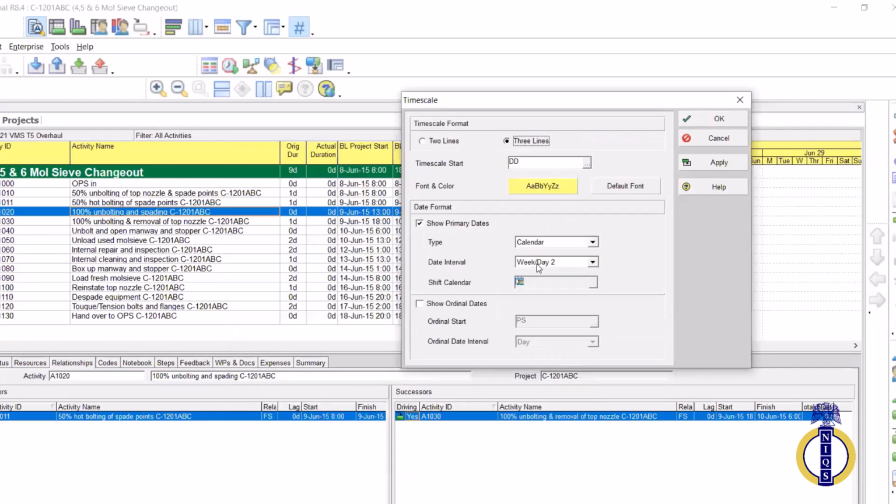So you see, I have week and day, because I plan in hours. So my reporting is every day, it's daily reporting. But if you have a big project spanning 2 years, 3 years, my projects are always very short, 30 days, 40 days, 50 days max. But if you have a project that's spanning 3 years, 5 years, you might not be reporting daily. Your progress report might not be daily. So you can make it weekly and monthly, right?